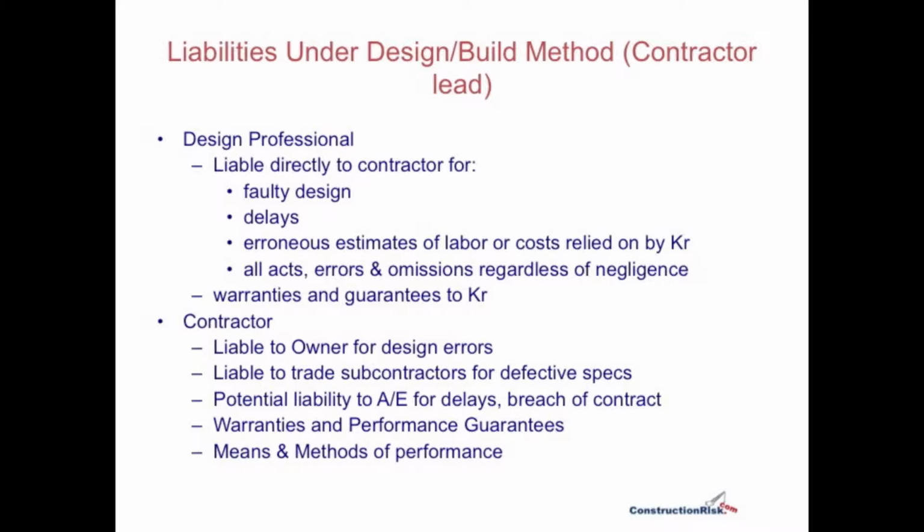And I see many of these contracts where the contractor takes the lead and the subcontract with the designer states that the designer is responsible for all the damages that it causes, and it doesn't say due to the negligence or willful misconduct of the designer, but rather it's anything due to problems or errors with the designer's services, which they often will call work. So again, become very aware of how that contract language reads.